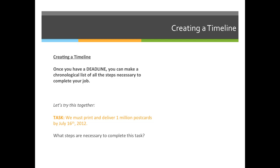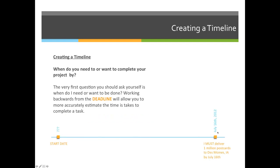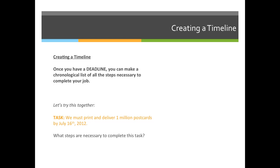Once you have a deadline, you can make a chronological list of all the steps necessary to complete your job. I want to point out that your quiz this week is to do basically the same thing we're about to do, but choose something in your everyday life. Let's try this together: we're going to print and deliver 1 million postcards by July 16, 2012. We must identify the deadline — July 16 — and note that we must deliver 1 million postcards to Des Moines, Iowa.